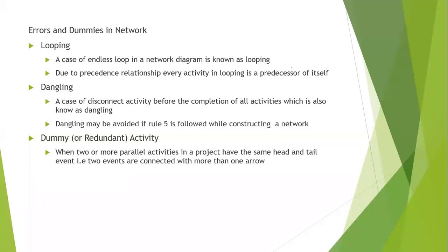Okay, there is some extra activity which is there, which we did not think of. Now coming to dummy, always remember when two or more parallel activities in a project have the same head and tail, then only it is called a dummy. I have to create a dummy activity, where two or more parallel activities have the same head and tail event.